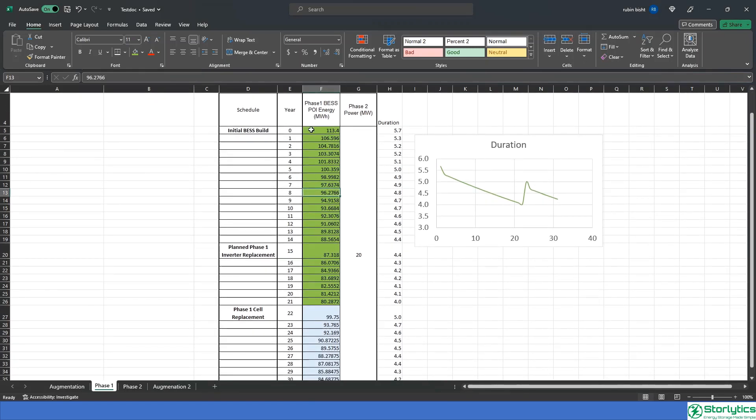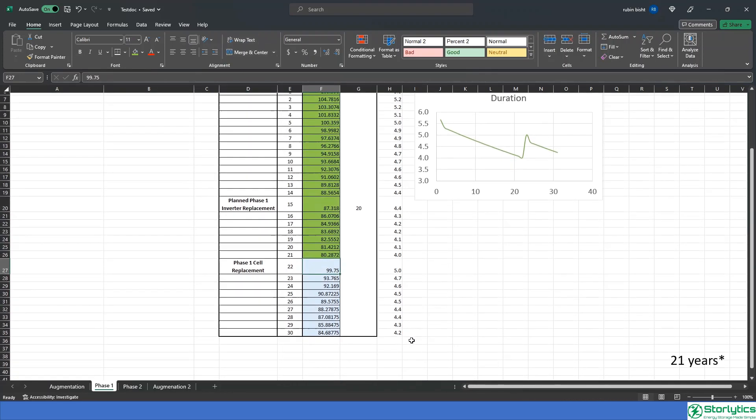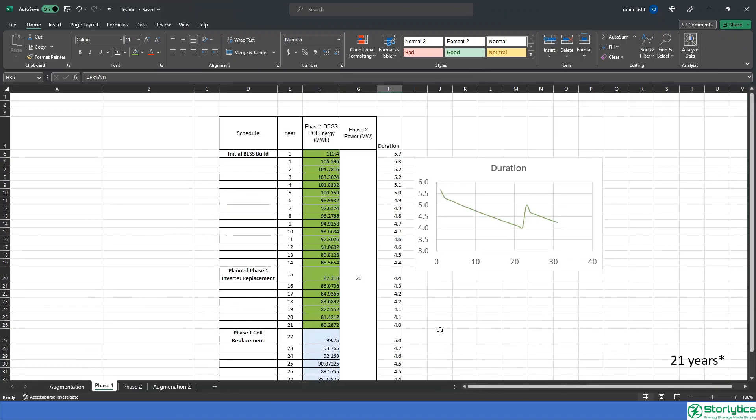Based on the degradation, the beginning of life capacity can be determined such that at 20 years, or the end of life, the project can sustain a four hour operation.